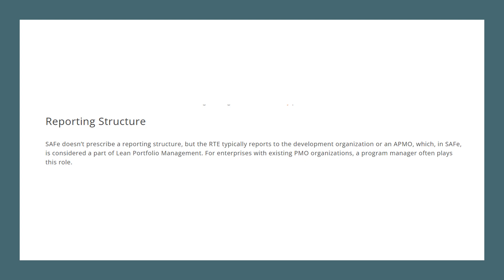Now let's understand the reporting structure for the Release Train Engineer. SAFe does not prescribe or recommend a specific reporting structure, but generally the Release Train Engineer reports to the development organization or an Agile Program Management Office, which is part of Lean Portfolio Management. For enterprises with an existing PMO organization, a program manager often plays this equivalent role of Release Train Engineer.